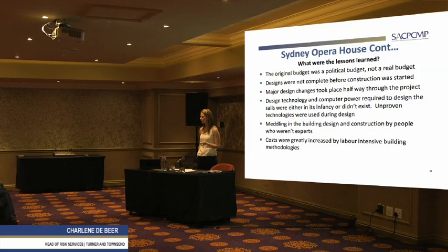So if we say, well, we're going to weld X amount of inches and our defects are going to be less than 2%, etc., because we think that out of, let's say, the 10,000 skilled welders we have in our country, we are going to get 5,000 of them, then the question remains from a risk point of view: how sure are we that we're going to get 5,000 of those guys? So how realistic are your schedule and your costing, given what we know at this point in time and what we have at our disposal?